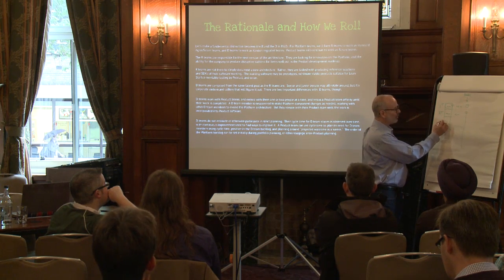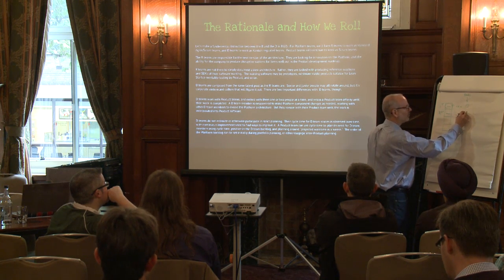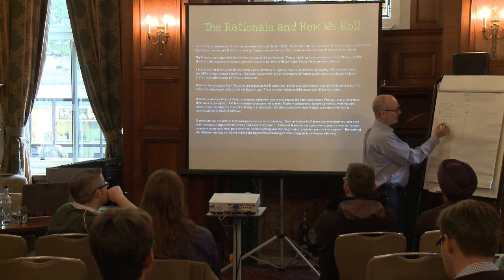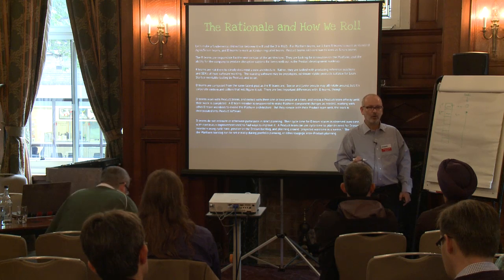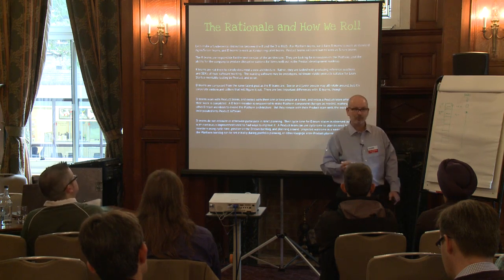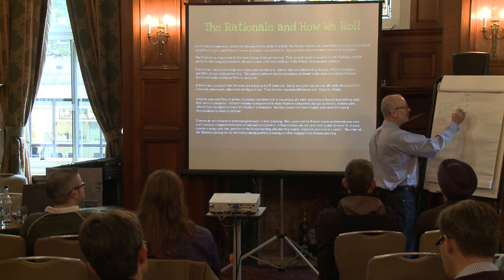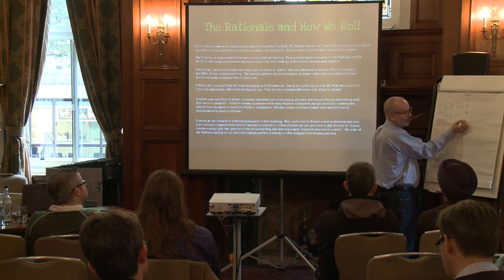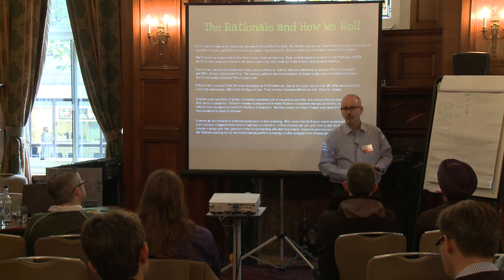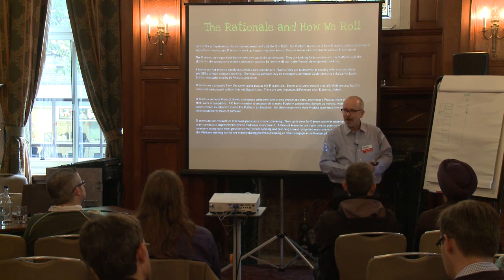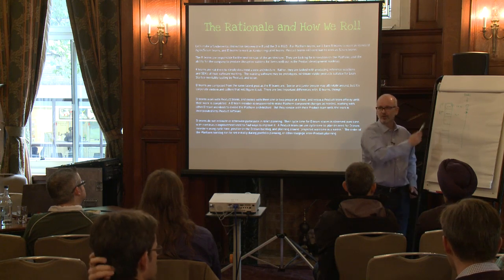This guy comes up, though, and says, oh, I just figured out one. It came out in our backlog grooming. We have this new squad-ready little tasky thing to do. Even though temporally it exists after this, we keep this in single ranked order based on the value, the ultimate value to the organization.